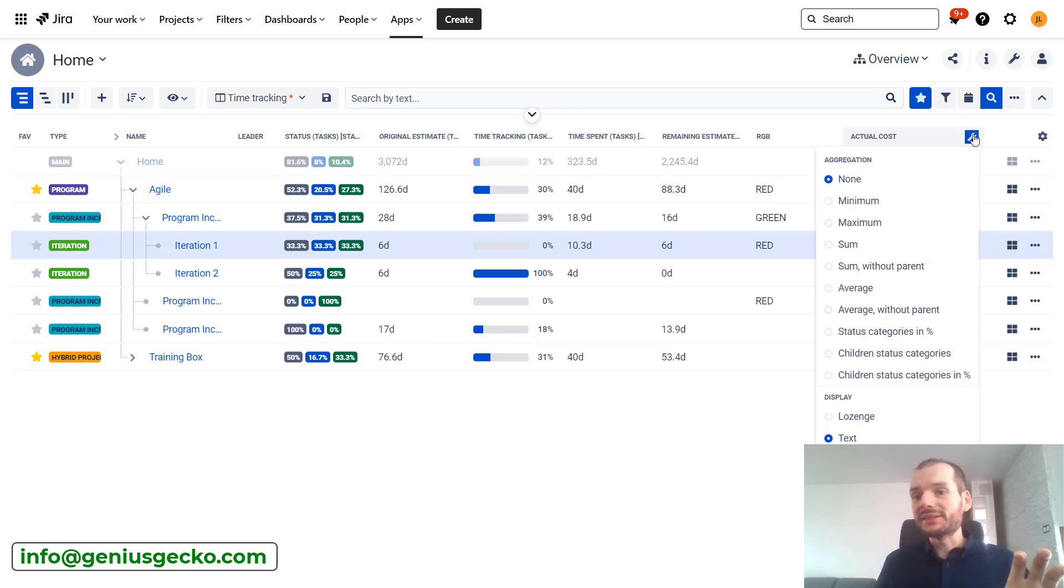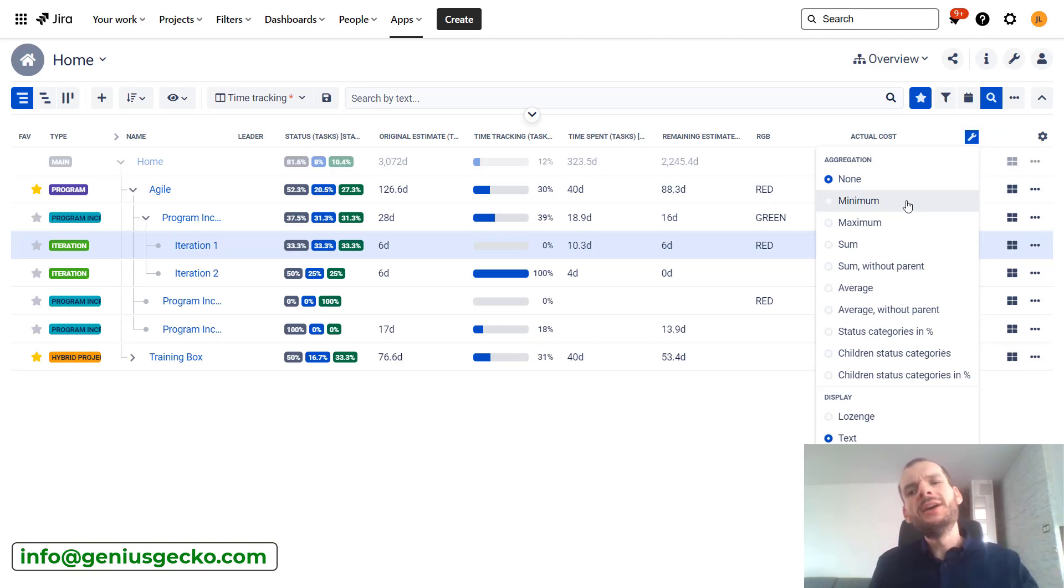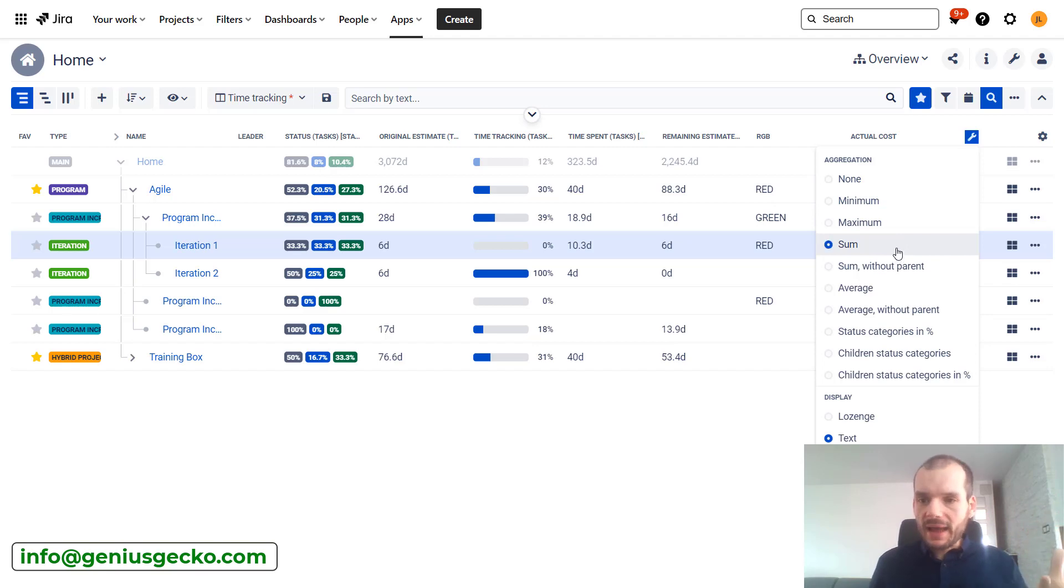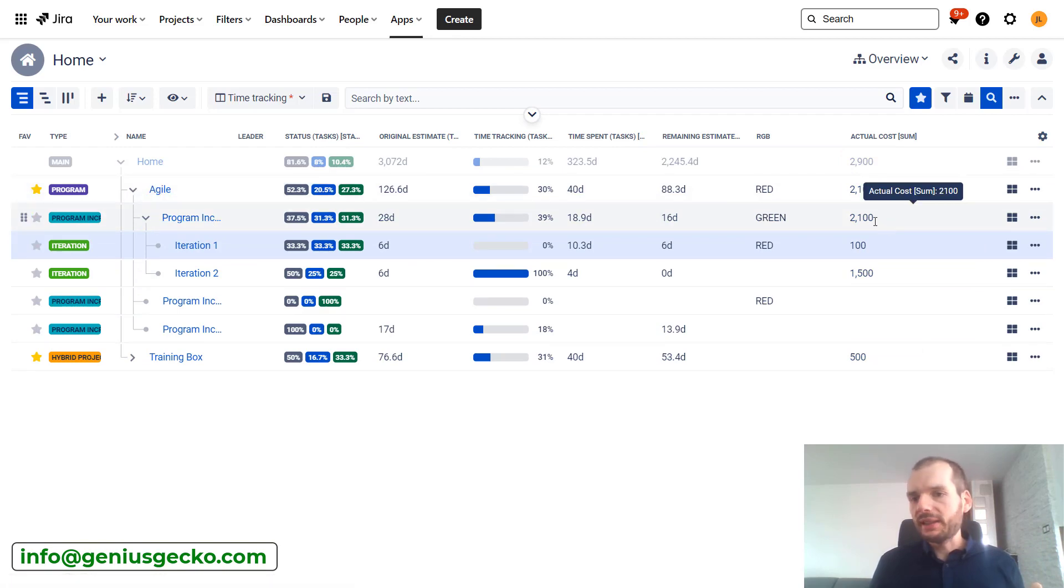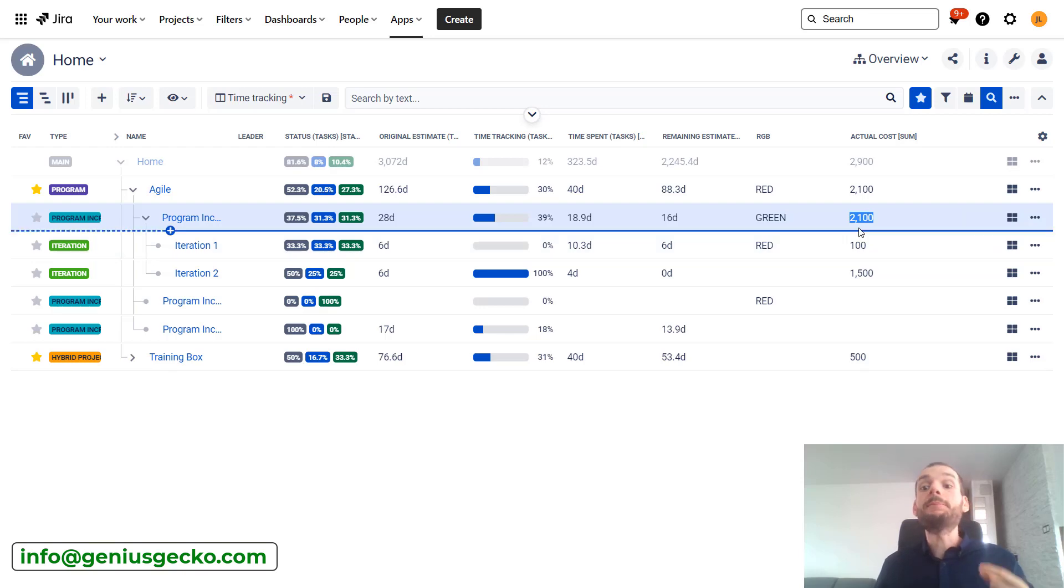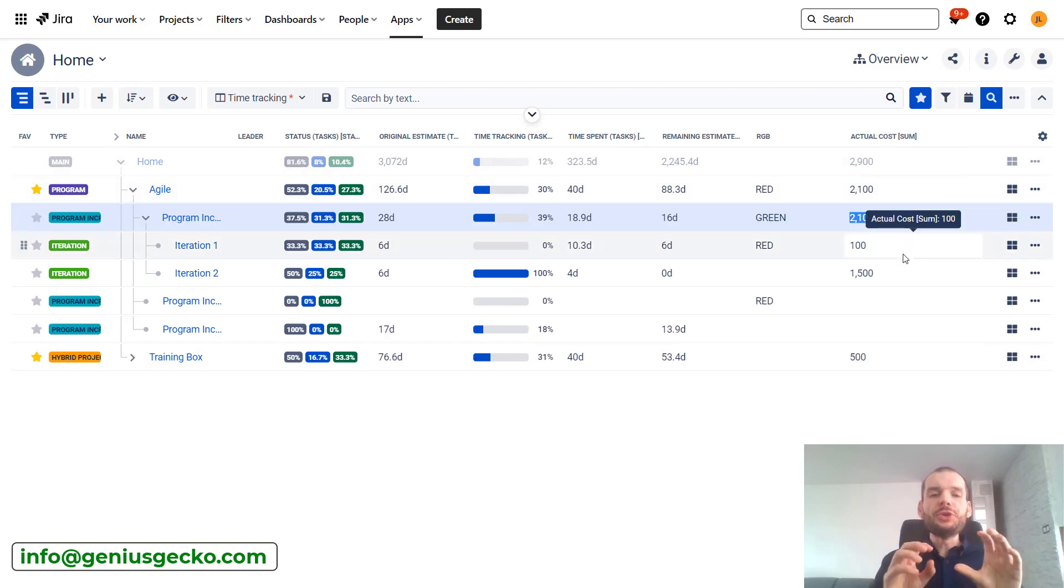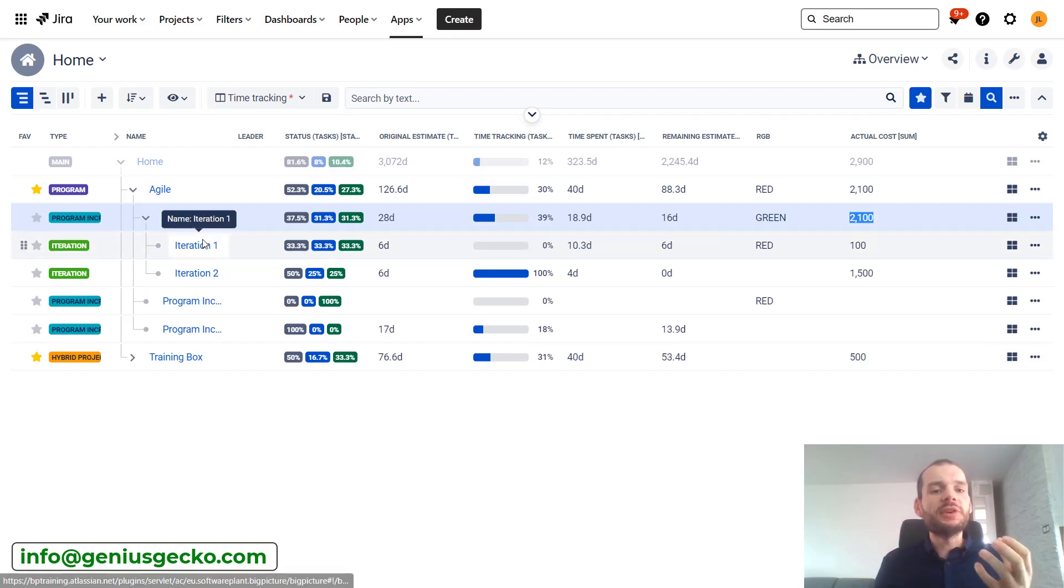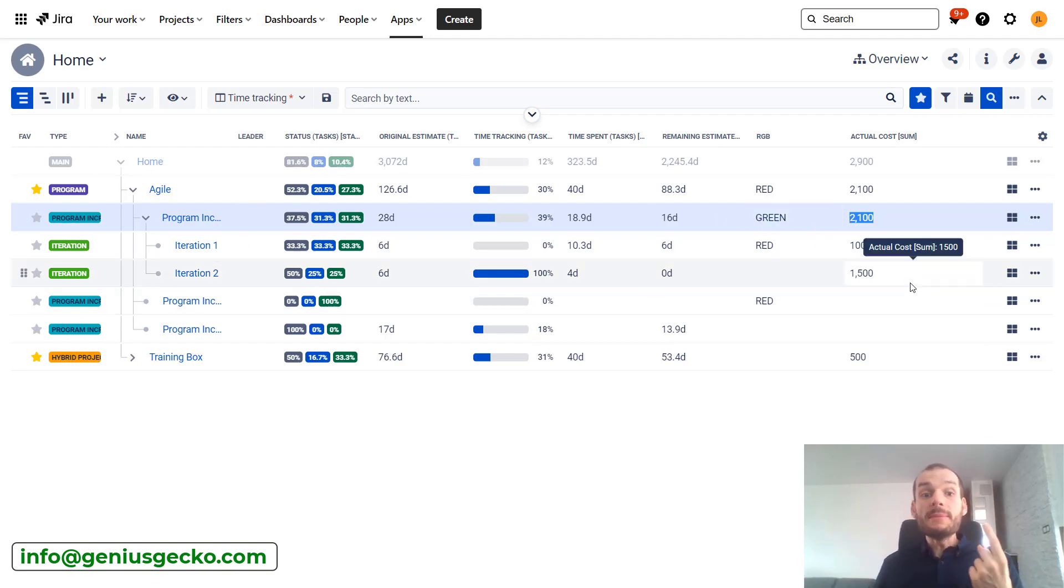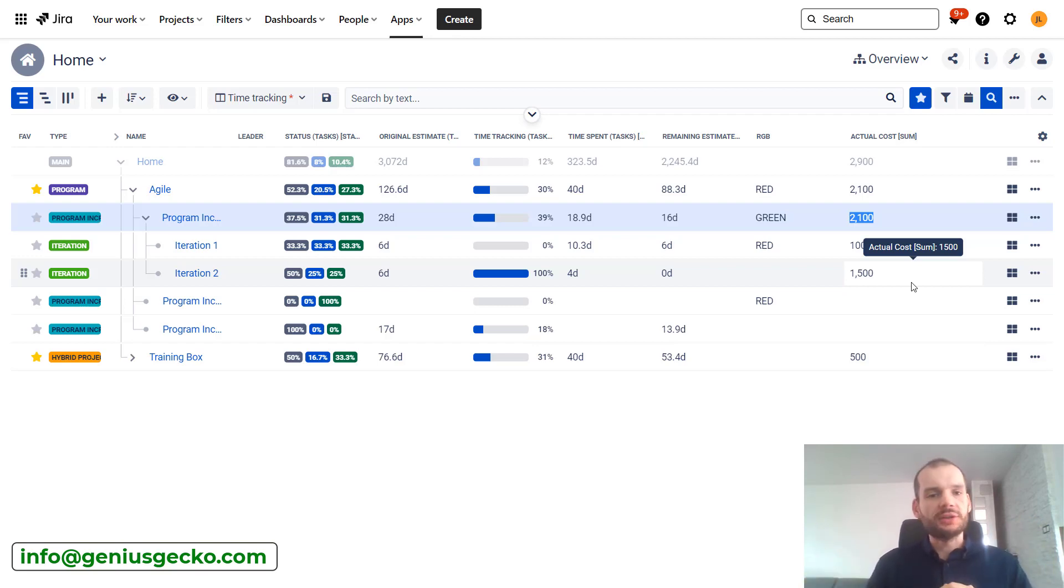What is interesting is that we can decide how parent boxes or how this information on parent box level should behave. Currently there is none, so we basically only display information from a specific box, but we could go to sum. Now, for example, on the program increment level, the value that we have is actually the sum of all of the children and the value that is stored on the program increment level. Using the cost example, you could decide what is the cost associated with each of the iterations, maybe each of a project phase, put it over here, sum it up, and see on the project level the overall cost of the project.